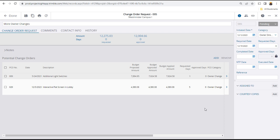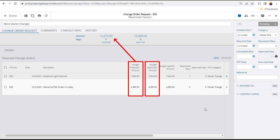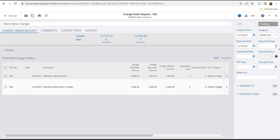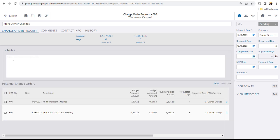The potential change orders will be added as line items to the change order request. The proposed and approved budget amounts automatically carry over to the summary. You'll want to enter the requested days based on the information in the PCOs. Enter a more detailed description in the notes field.